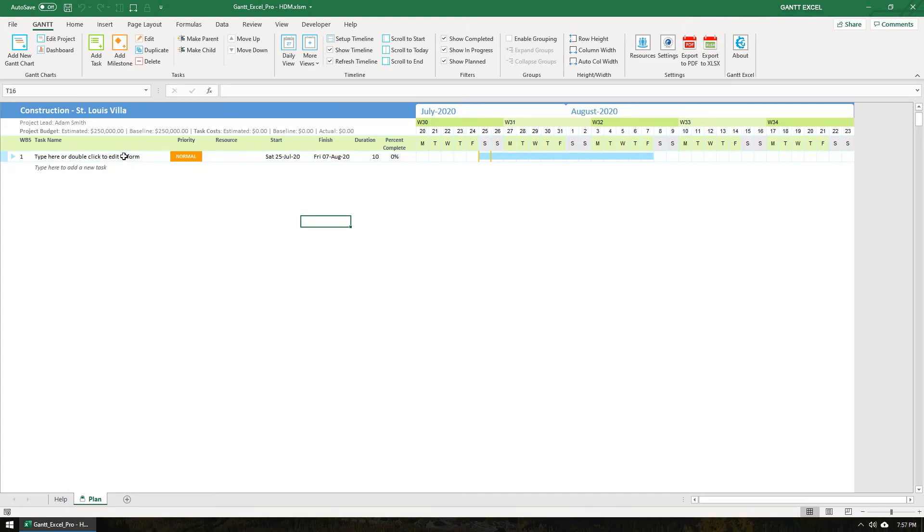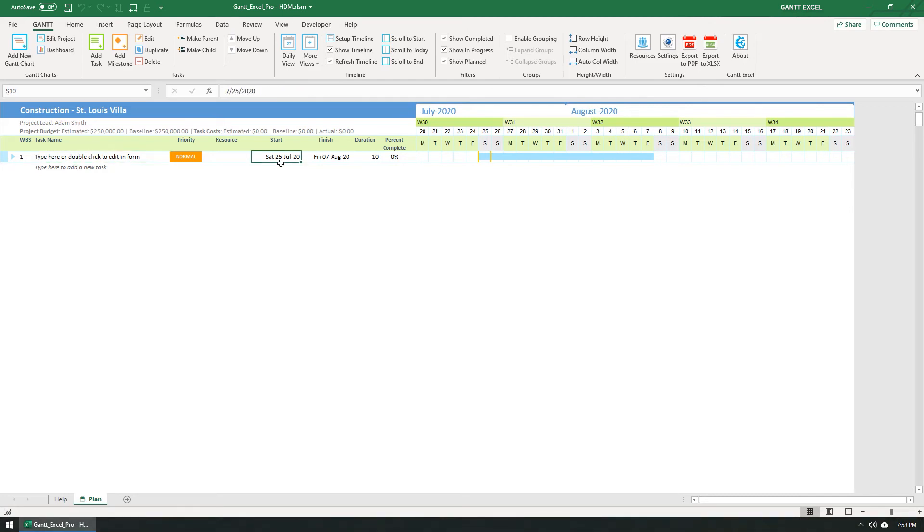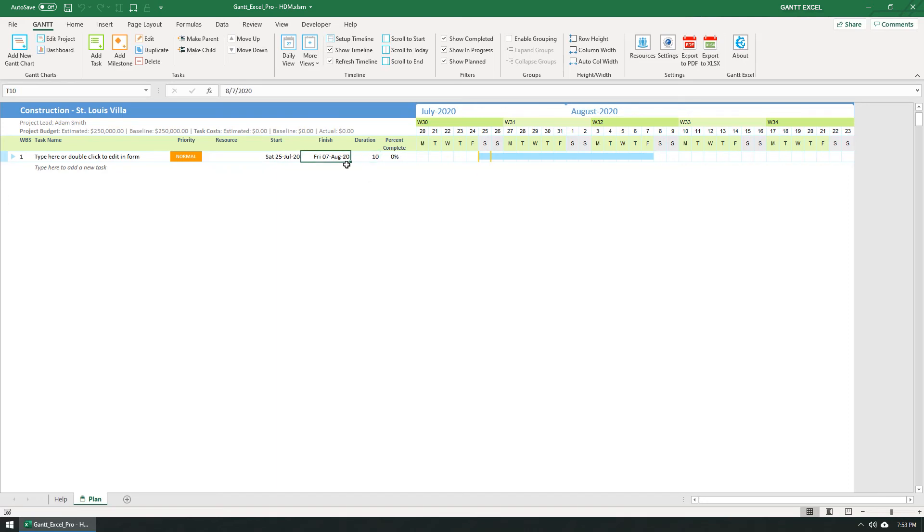By default, a new task has been created. The start date, which is also known as the estimated start date, is set to today's date. The default duration of the task is set to 10 days. The finish date, which is also known as the estimated end date, is automatically calculated based on the start date plus duration, while accounting for work days and holidays.